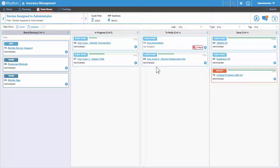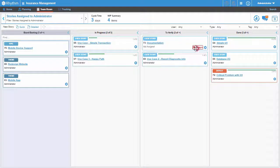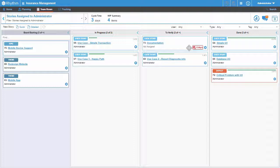Also note this indicator here, showing me that the documentation story has been sitting in the to verify lane for 4 days. This is displaying because we earlier set up an age indicator limit of 2 days for this swim lane in the Administration tool. This lets you see at a glance that one of your stories has been sitting around longer than a predetermined amount of time.